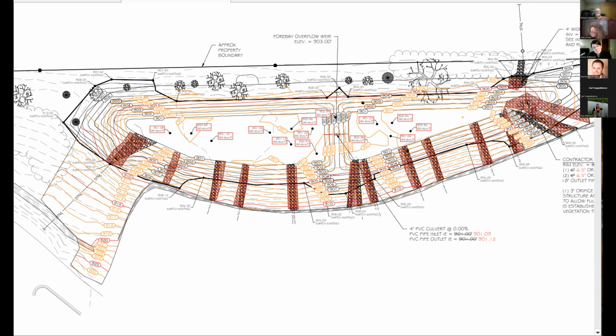We got all three of those parties together with me. And I think everybody worked in good faith and everybody did what they were supposed to do. Due to an unknown soil condition, the pond is not infiltrating. So we could go out and investigate. And I think the best thing that could happen out of that is another $30,000 plus worth of earthwork to potentially over-excavate the basin, backfill it with sand, replant it again, and try to put it back into service.